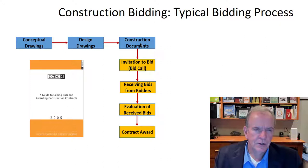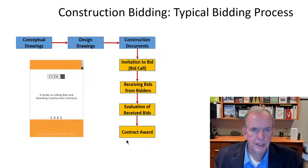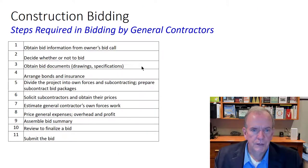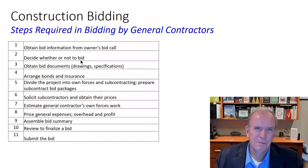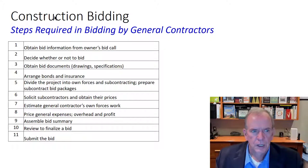The process goes from conceptual drawings to design drawings to construction drawings, then an invitation to bid, a bid call, receiving bids from bidders, evaluation of the received bids, and then contract award. With the invitation to bid you obtain the bid information and decide whether this is something you want to do — is this something you're competitive enough to potentially win?